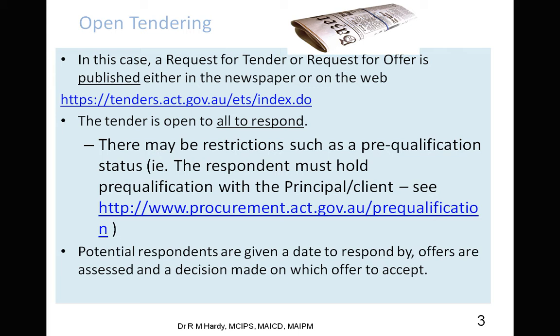with the documents. You know, you haven't covered this. What are we going to do here, and so on and so forth. So as questions come back, there's a question and answer period. The person running the tender, generally the architect, then needs to answer those questions first of all, and then distribute the answers for those questions to all the tenderers so that everybody is on the same page. Okay, so this is a very transparent system, but it often is a lot of work for